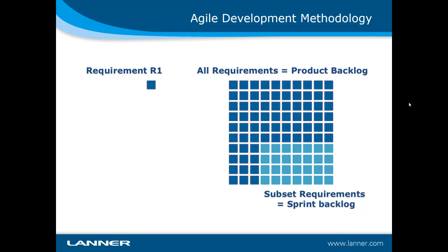We time bound it, so for example we might think, how many of these requirements can we get within a 2-week period, and identify the sprint via how much we can fit into that 2-week period, rather than say we want to complete these requirements, therefore how long will our sprint be.